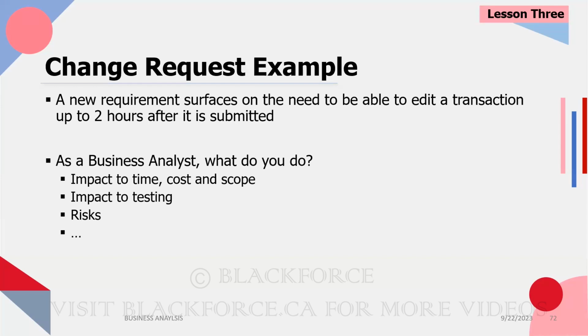Okay, so let's look at an example. A new requirement surfaces on the need to be able to edit a transaction up to 2 hours after it is submitted. As a business analyst, what do you do? You start thinking, right? What is the impact to time, cost, and scope? What is the impact to testing? What are the risks involved?